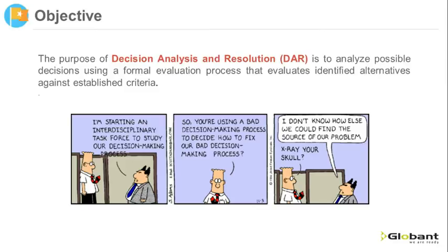This process is applicable in a project not only to decisions related to daily management, but also is important to apply it in technical decisions. For example, when alternatives to solve a requirement are considered, when we have architectural alternatives or different technologies that can be used. For technical decisions, this process will be applied by the project technical leader and technical director. And in management decisions, the responsible will be the project manager, who will involve all relevant stakeholders.